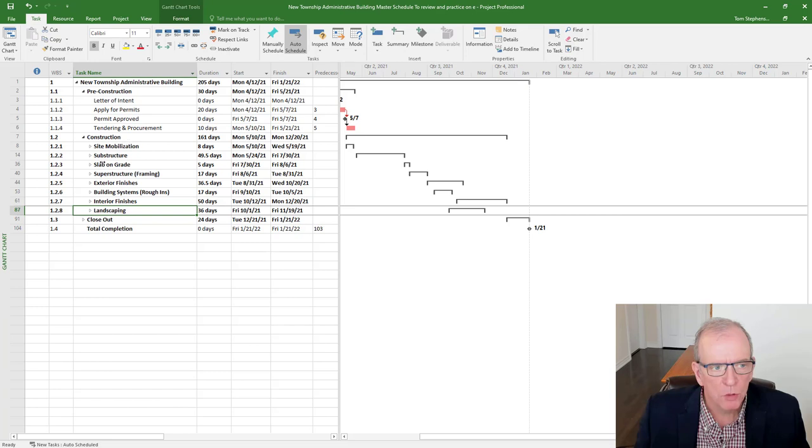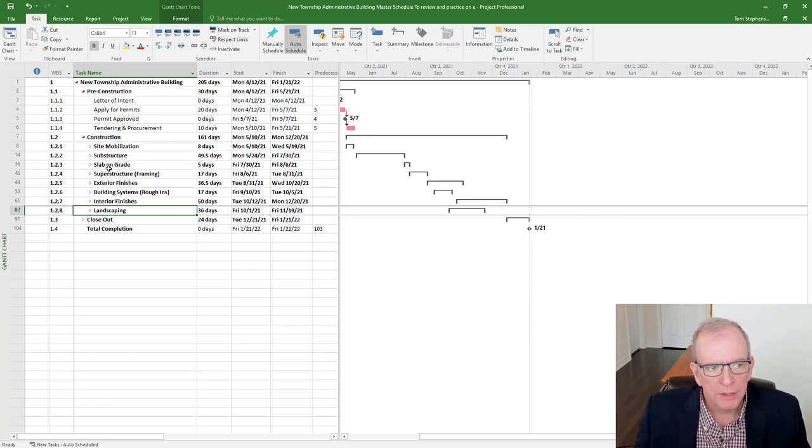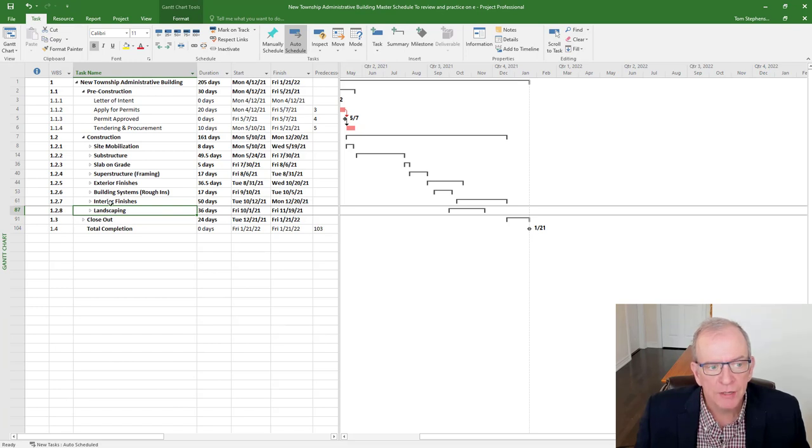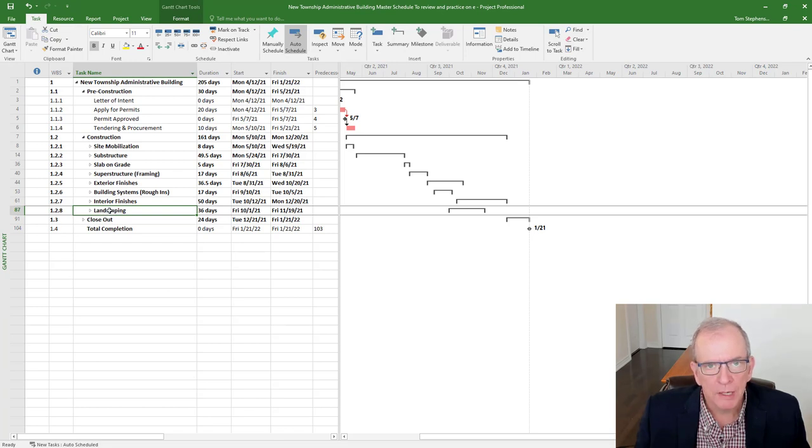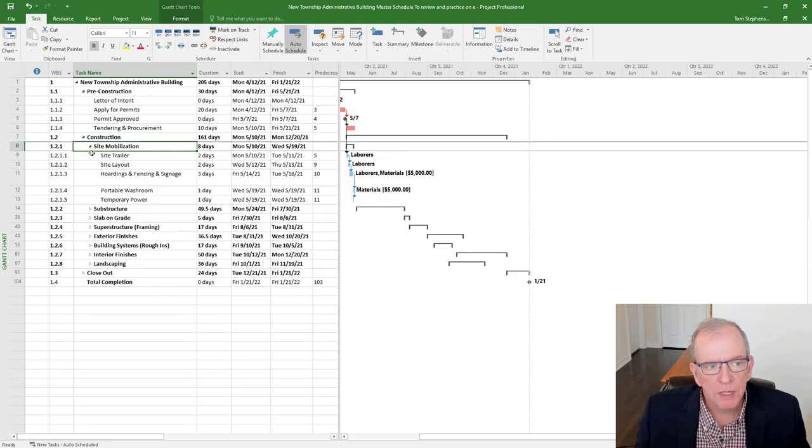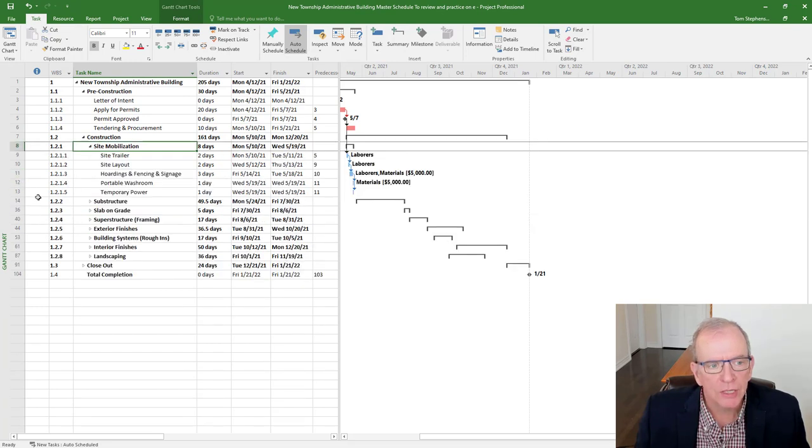So I've got site mobilization. I've got everything that's in the ground. I've got the slab on grade. I've got super structure. So the structural elements of the building. Then I'm dealing with exterior finishes, building systems, interior finishing, and the landscaping, both the hard and soft scaping, if you will, like driveways and curbs and trees and grass and all those things. And so I've got it under headings.